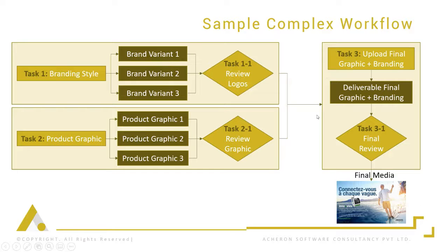You create another task for the layout team and provide options of uploading multiple media, which would be reviewed by the final approving authority and given for downstream publishing. Now, this task would not start or become active until the previous tasks are completed.